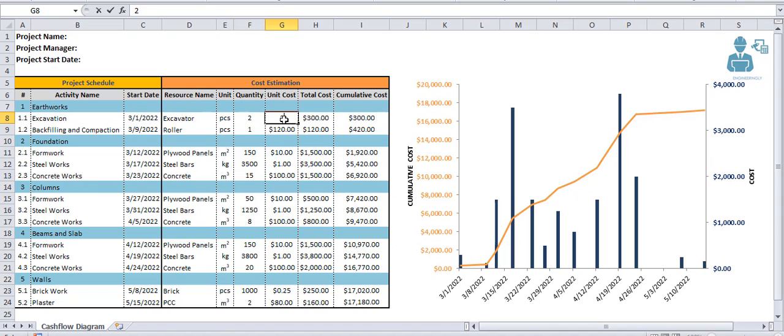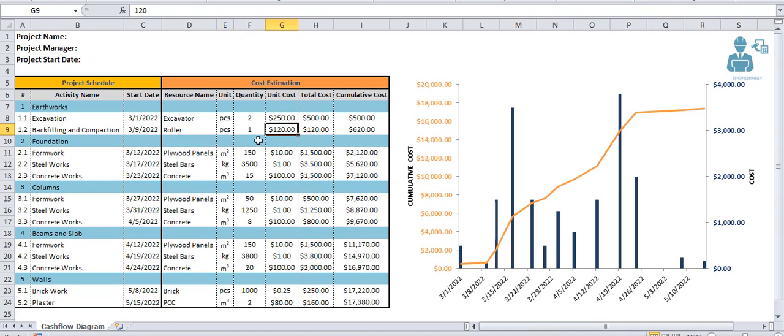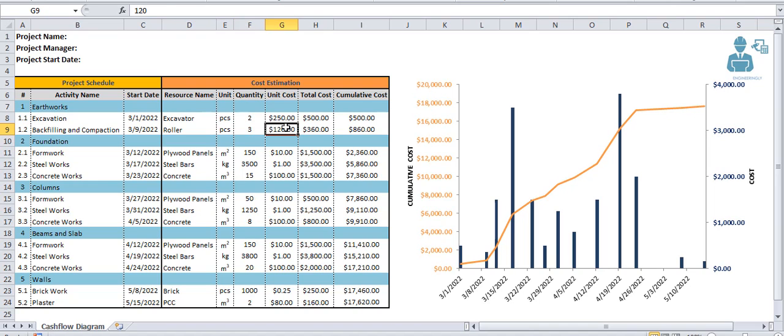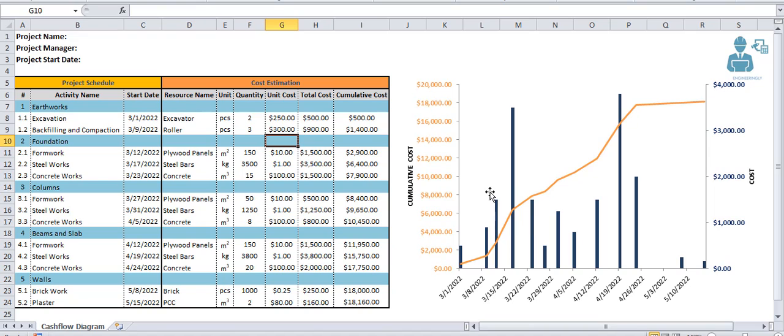The amount of rollers that we need to perform backfilling and compaction will be 3. Each of them will cost us, for example, $300. As you can see, there are changes in the diagram.